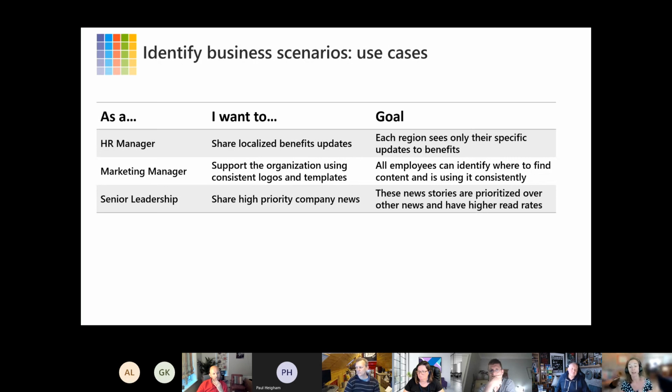Now we can take these and look at the different impacts in that maturity model, and we can help prioritize those projects across departments. Really often, this is where I find organizations getting pretty caught up where every department's project is the most important, of course, because that's their goal. But if you take that and hold that up against the company goals and you hold that up against what maturity you're at and how hard it is to get to the next level, it's going to become pretty clear pretty quickly which ones should go first and which ones are going to have that highest impact.